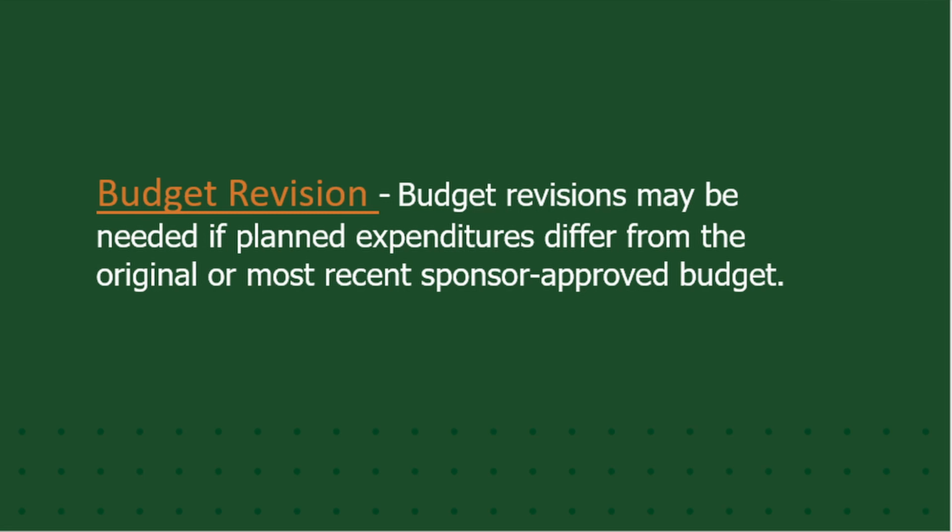and especially if the award terms don't allow for that, that might be the kind of thing where we need to do a budget revision. If you are going to be using the money in the same categories, but just over an extended period of time, that might just be more of an NCE and less of a budget revision. So it kind of depends on what you're thinking of doing with the money.